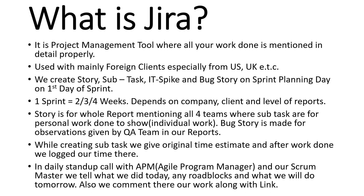The third point is we create stories, subtasks, IT spikes, and bug stories on sprint planning day. We have a sprint of either two weeks, three weeks, or four weeks, depending upon the company and the level of the project. If the reports are really advanced, the sprint will be like four weeks; if basic or intermediate, then two to three weeks.